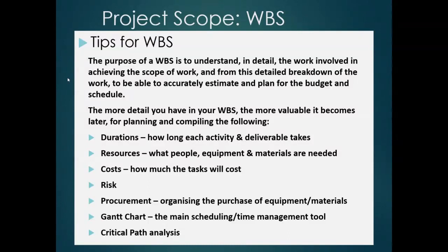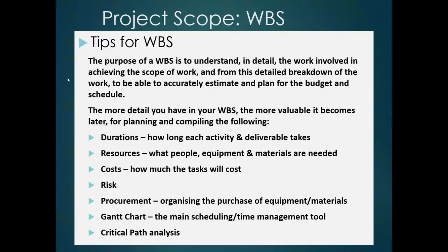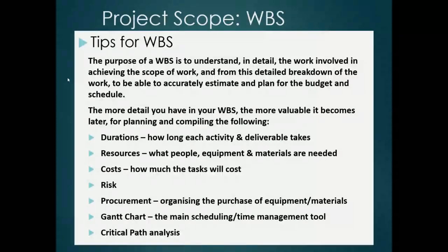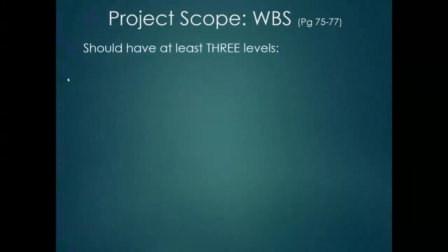The purpose of a WBS is to understand in detail the work involved in achieving the scope, and from that detailed breakdown to be able to accurately estimate and plan for the budget and the schedule. Breaking down the work into smaller chunks gives you greater confidence in working out how long each thing is going to take and how much each element will cost. The more detail you have, the more valuable it becomes for planning durations, deliverables, resources, costs, risks, procurement, the Gantt chart, and the critical path analysis.